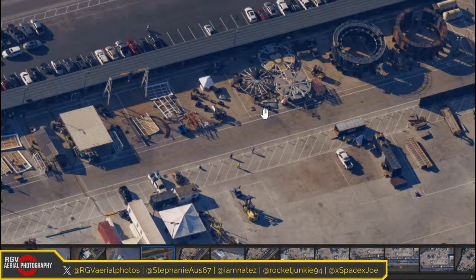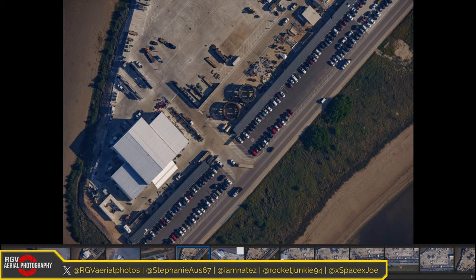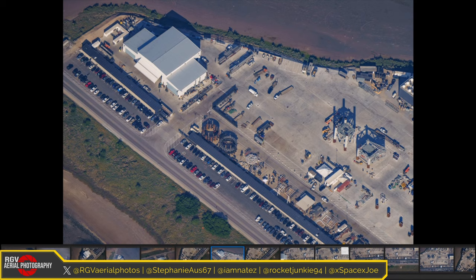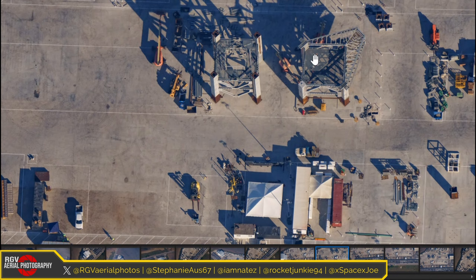Okay, well, we're here. A quick look at the tower sections. Hasn't had much work done this week. Yeah, I think they're just waiting on the sheaves to be installed in the tower and the crown block. I keep wondering where those sheaves are. Because obviously they can't do the roof of section 9 on the right there until those sheaves are gone in. So I think that's just what they're waiting on at the moment.